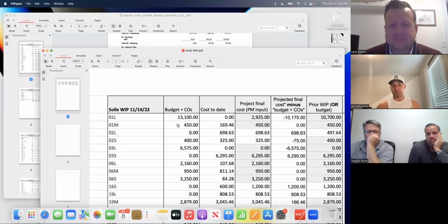Our building supplier will pick up materials for $100. They'll come back and pick it up, $150, I think, is the return fee. So they do the math. Does it make sense for me to load all this stuff up, organize it, return it, get a receipt, whatever, spend 3 hours doing that, where I could be doing something productive and not have that loss of time, or spend $150 and let them come pick it up, and we get the return credit back towards the job, right?